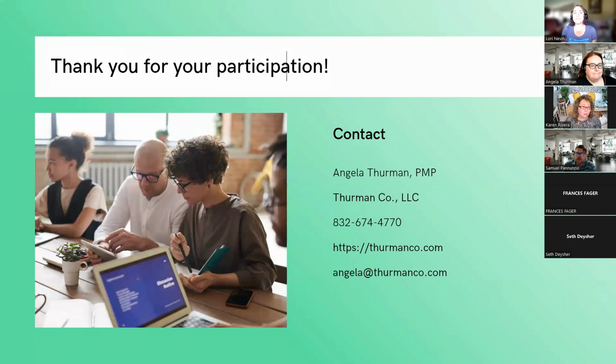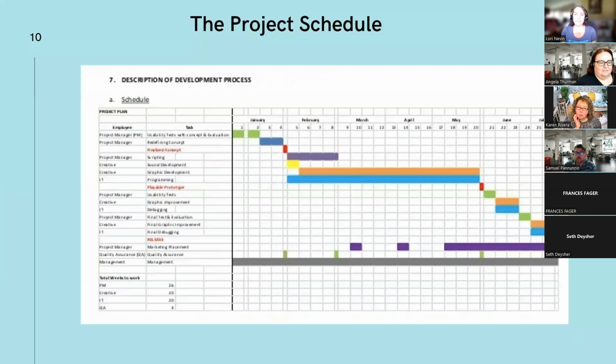Yeah, just commenting again on the risk, Karen. Risk is seen from financial aspects, from scope, from hours, from resources. So say, for example, you had resources of 10 people and you thought potentially you needed 11 people to account for some risk. That would be seen in your resources for people. Financial risk could be like, you thought it was going to be $100 and now it's $110. So you would put in a little bit more contingency to account for those risks.